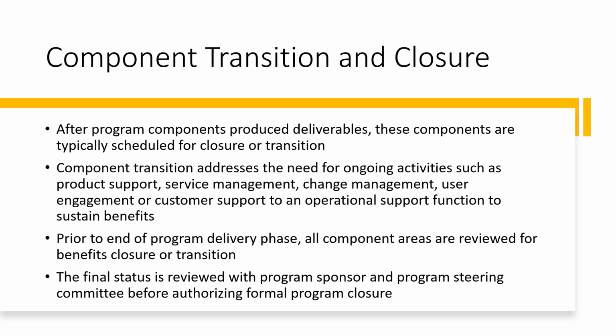The final sub-phase of the program delivery phase is component transition and closure. How am I going to handle my component transition, and how am I going to close the components within my program? After program components produce deliverables, these components are typically scheduled for closure or transition. Component transition addresses the need for ongoing activities such as product support, service management, change management, user engagement, or customer support, handing them to an operational support function to sustain benefits.